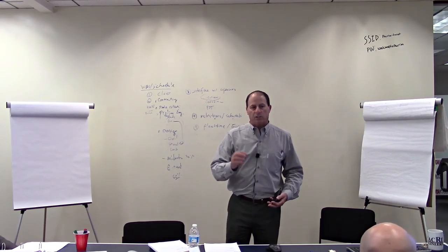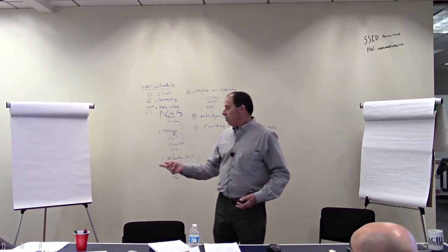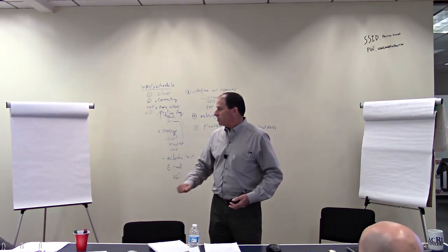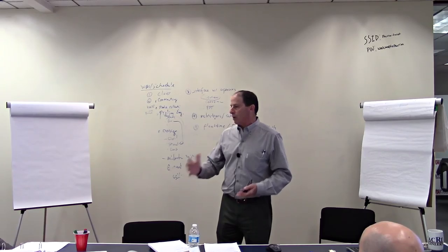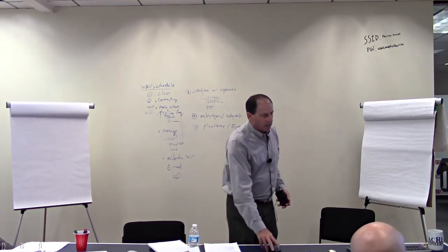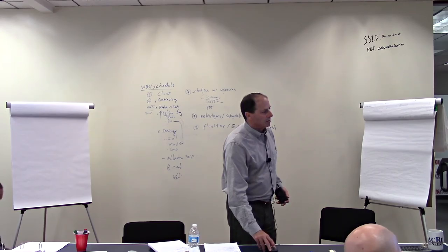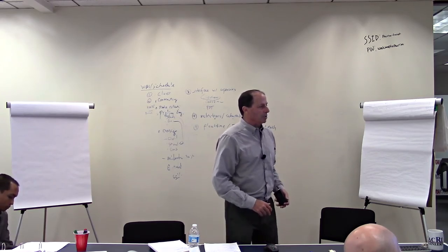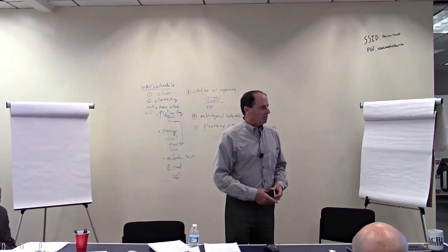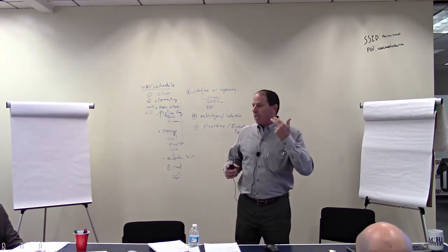Then we get into some of the procedures. We define there's some over-the-shoulder things. There's inter-discipline reviews, because this plan applies to everybody. It's not just what we're doing ourselves. We have subs. It's about how we assure that their work is correct. We make them follow the same procedure, marking up their plans, like the plans you had at the interview, Marco and Marwan, where we showed the yellowed out stuff and all that. So our subs, we make them provide that same thing to us, and we copy that package to the client so they can see that.